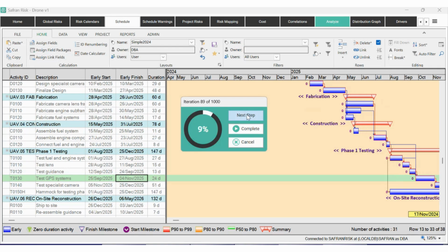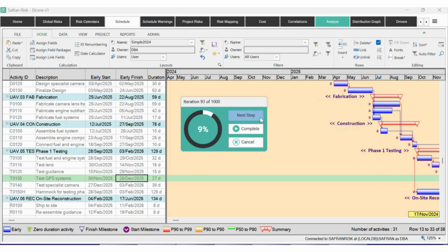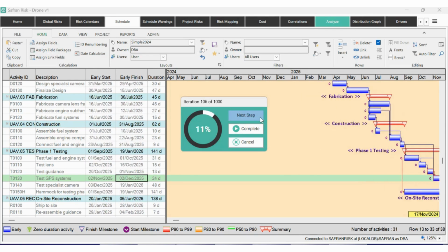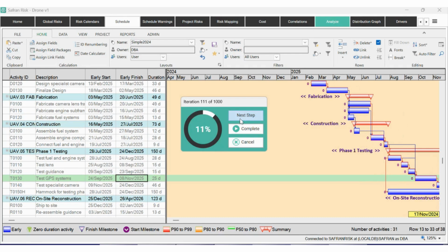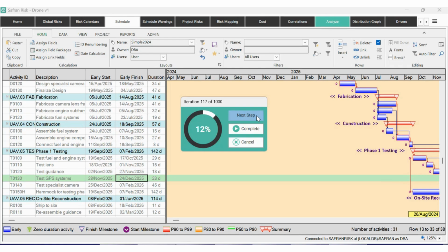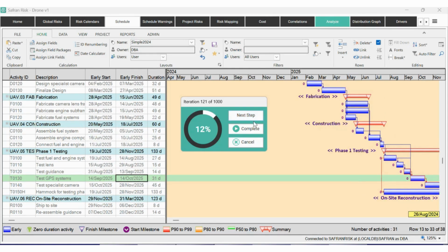Likewise, maybe we've realized some opportunities, or we've changed the way in which we're managing the project, and actually rather than them taking place in September and October time, maybe they're taking place earlier in the year, in which case, once again, maybe we don't need to add on that contingency. And so the whole idea here is that we want to make sure that whenever the activities are simulated as taking place when we run a simulation, we're also capturing the impact of this probabilistic downtime, this downtime which is itself uncertain.